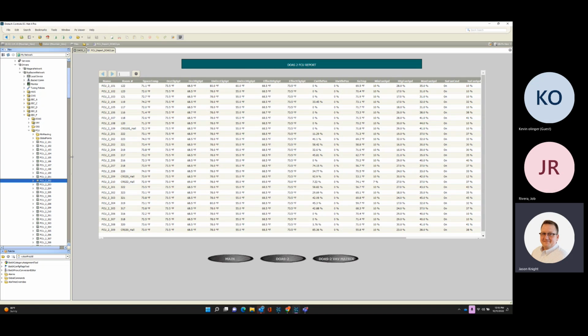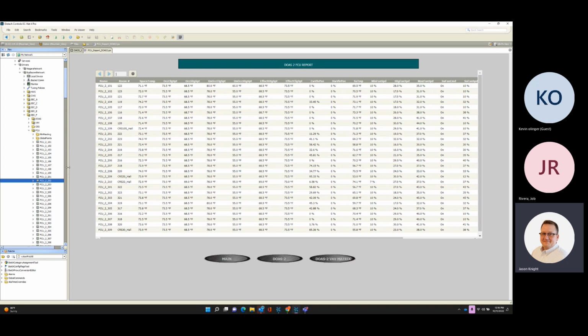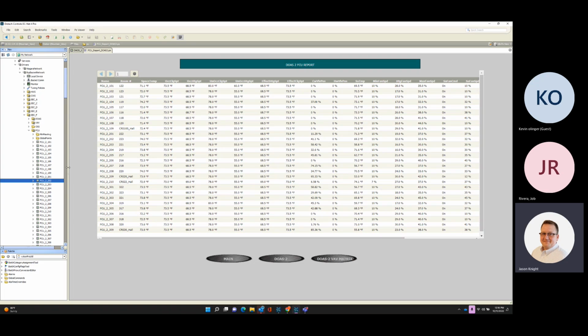I tried explaining this from the beginning all the way to the end, and they just didn't get it. Ultimately, after about 10 meetings, Derek got it. He was just like, here's what we're going to do. We're going to have you sit on our network. It'll be fine. We are going to issue you the IP addresses. And I was basically like, okay, we'll just understand that we can't get you MAC addresses until this is completed; we have to physically have these on site. So that was one of the big issues we had with the initial construction of this project.